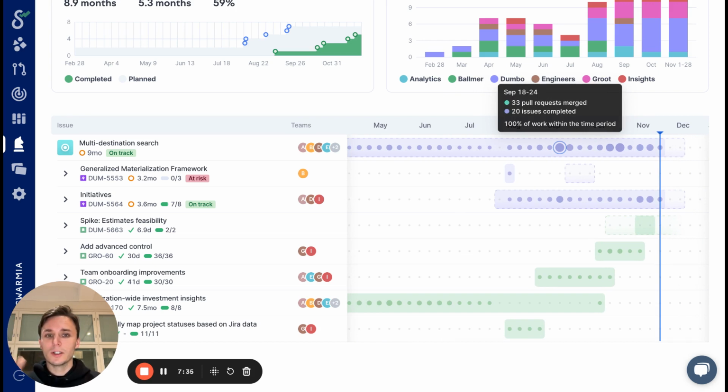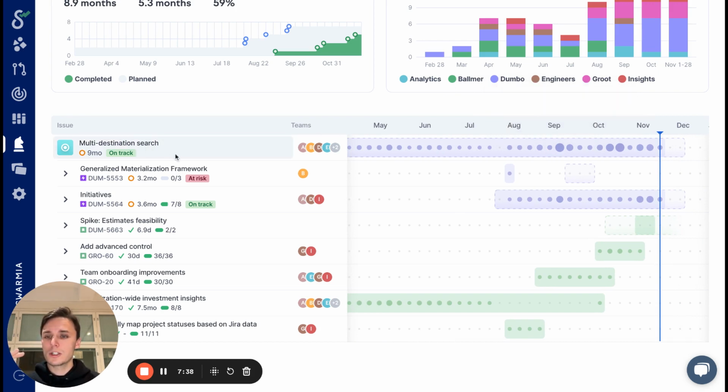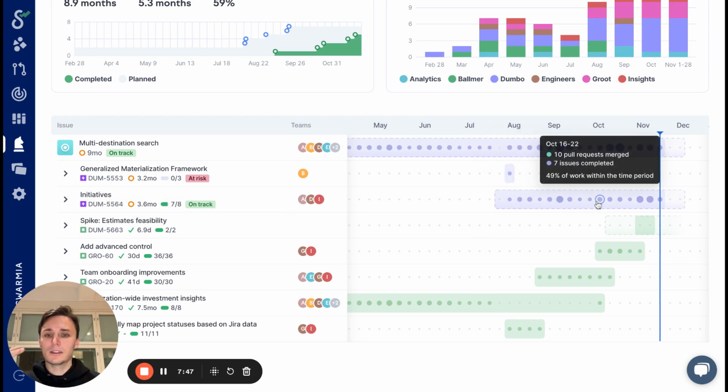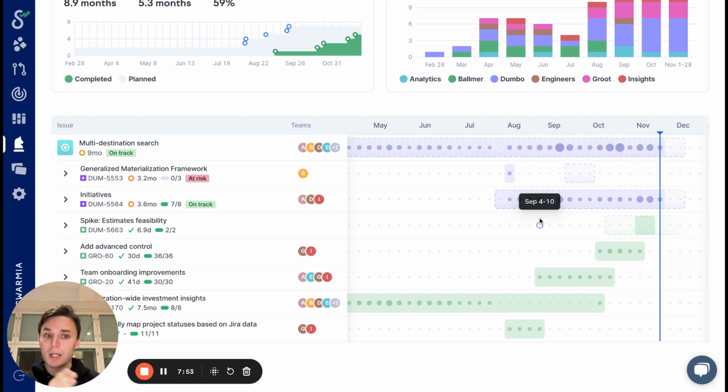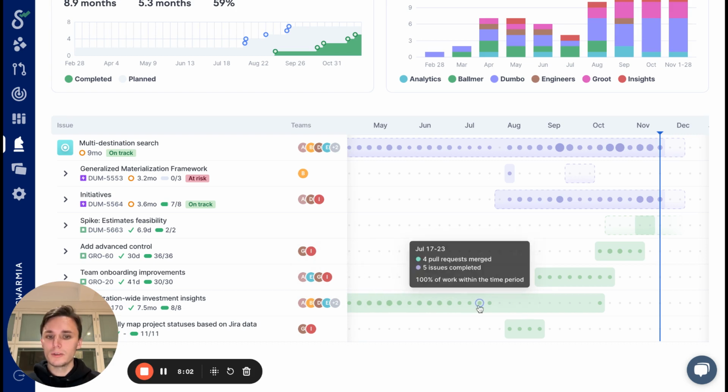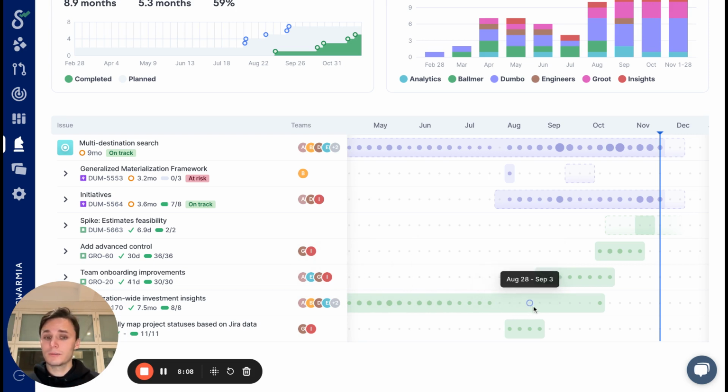And so what it helps you to do is to identify patterns and gaps in activity. You'd want to make sure that on every level, starting from the initiative itself to the epics and stories and all the work that is linked to the initiative, there's progress happening all the time and that the responsible teams are able to prioritize work that goes to the initiative. And then every once in a while, you will spot a situation like this, where there was activity happening consistently, you're moving towards your target, and then for some reason, there is nothing. At this point, it's important to understand what happened there and why we were not able to make progress for a longer period of time.